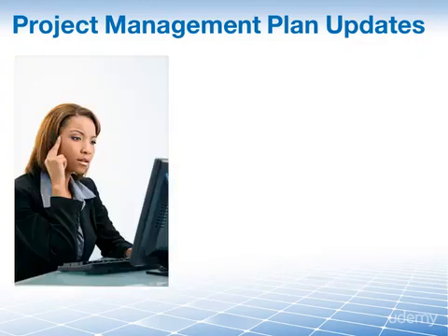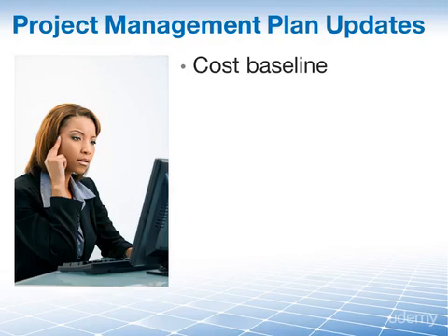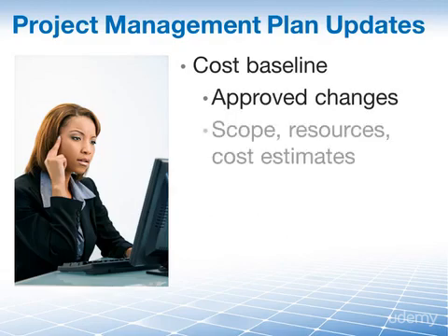The cost baseline may need to be updated, for example, if changes were approved that affected the scope, resources, and cost estimates. Then it may be the case that the cost baseline needs to be corrected to have a better, or shall we say a more realistic basis for our performance measurements, because you would not want your future performance goals to be tied to a cost baseline that is now out of date and no longer makes sense.